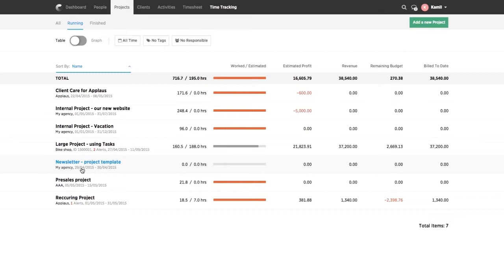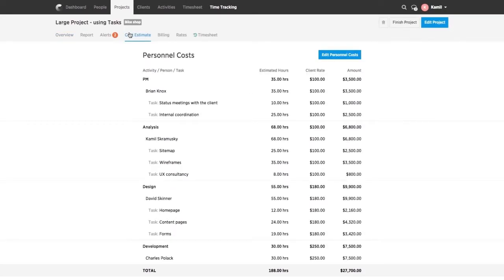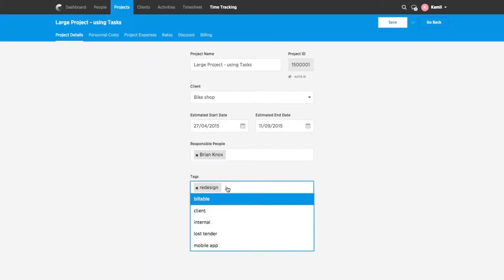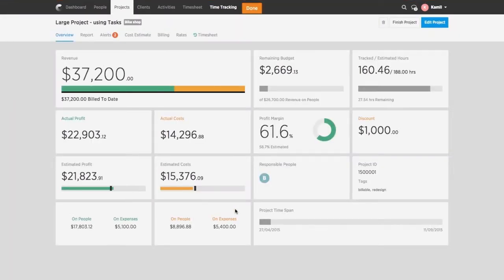This is why it's important to use the offered filters and see how only billable projects are doing. Filter tags are used for this purpose. The condition is that you tag the individual projects. You can do this either when creating them or later by accessing the project details, clicking on the Cost Estimate tab, and editing it in Projects Details section. Tag the project down here, then confirm the change by clicking on Save.